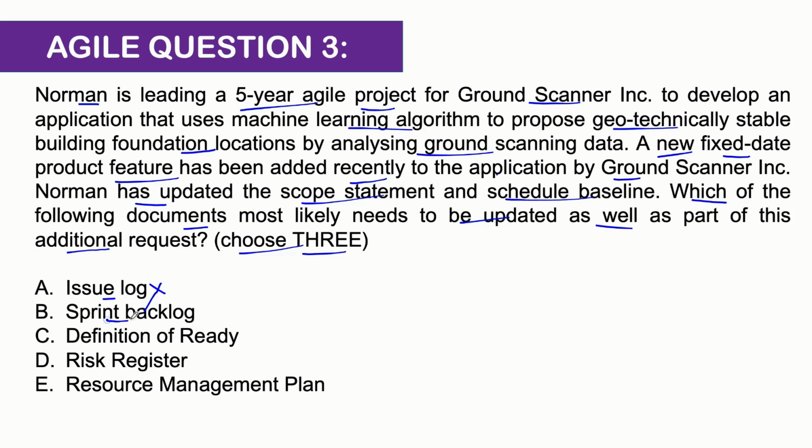Let's go to sprint backlog. Okay, so this is where again understanding the basics of Agile will be very important, guys, because you need to understand the difference between a sprint backlog and a product backlog. Okay, so if you know this and you analyze this question very critically, you will understand that that's a product feature that's getting added into your Agile scope. So then you go and update the product backlog. You don't update the sprint backlog because sprint backlog is a subset of your whole product backlog, and it is